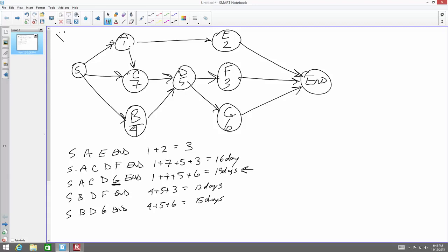Project cost accounting is done by your accounting department as the work progresses. So you win the work, and as the work goes along, that cost accounting department keeps track of how your billings are going and how your project's progressing, so you know whether you made money or not. In competitive bidding, when the bids are all opened, the owner will normally award the contract to the lowest available bidder, qualified bidder, responsible bidder, bonded bidder.